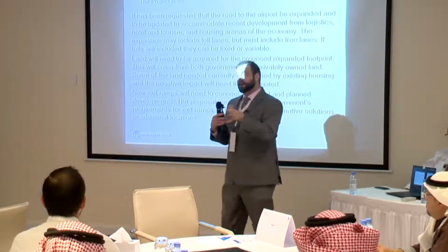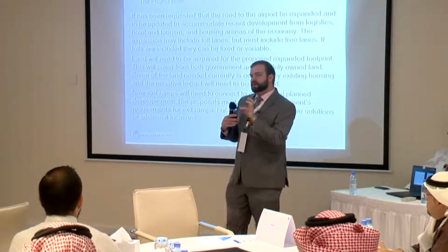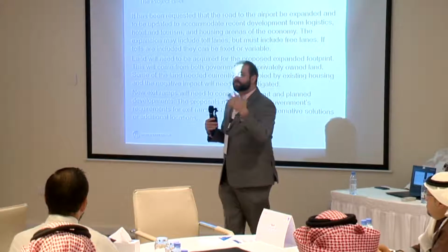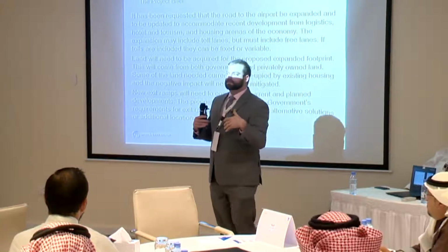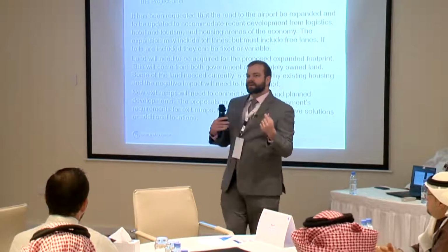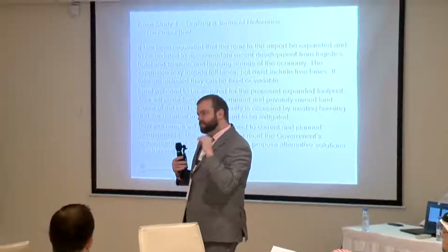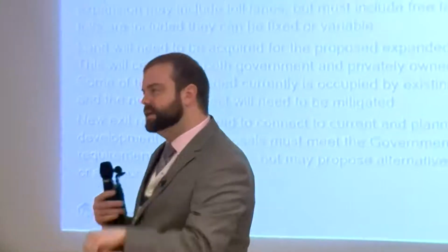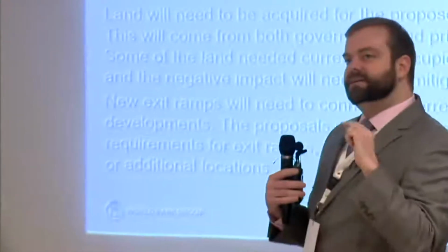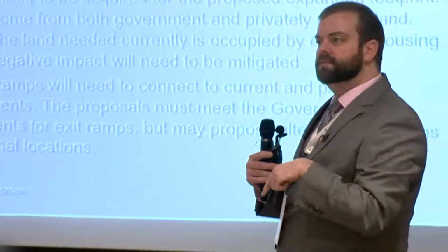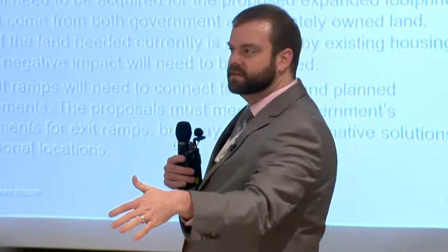Some of you allowed for a little bit more freedom in the TOR, allowing the private sector to give you more innovation. So when you do it, I would hesitate to specify, unless you know perfectly well that this exit needs to go right here, you just say there needs to be an exit that connects this area to the road. And the private sector can provide that innovation.